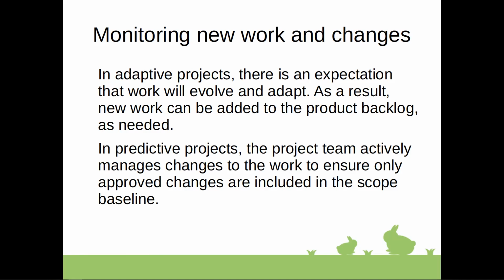the project team actively manages the changes to the work to ensure only the approved changes are included in the scope baseline. So any changes to the scope are then accompanied by changes to the resources, the people, the schedule, and the budget.